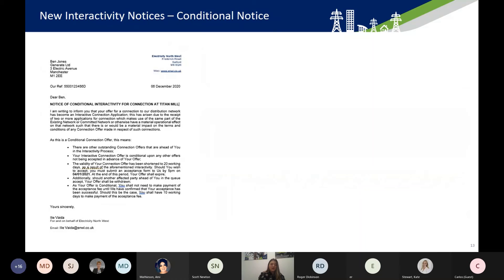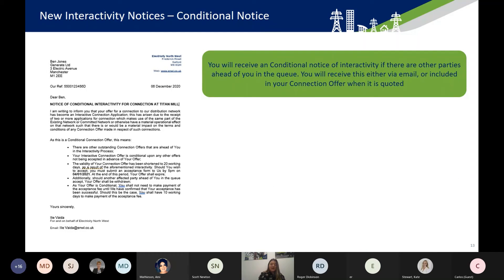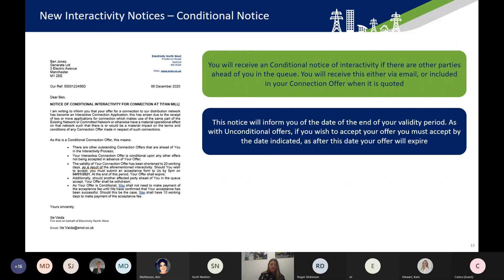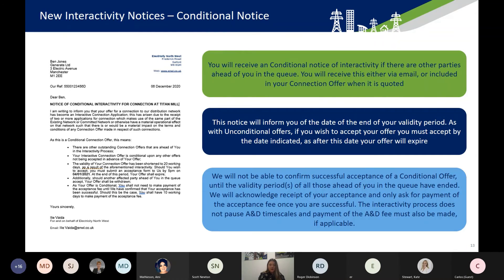For conditional notices, very similarly, you'll get a conditional notice either via email or in your connection offer. It will give you the end date of the validity period, and you must accept by this date or the offer will expire. Because there are other parties ahead of you, we aren't able to confirm successful acceptance until the validity periods of all those ahead of you have ended. We will always acknowledge receipt of your acceptance. We'll only ask you to make payment of the acceptance fee once we've declared your acceptance as successful. However, this process doesn't pause A&D timescales, so you must still make payment of the A&D fee by the deadline indicated on your invoice.